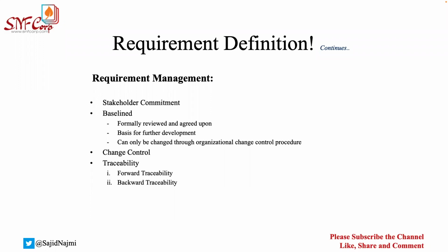So what is forward traceability and what is backward traceability? We know traceability is something we need to track from one source to a different source. Forward traceability means you are going from your traceability matrix to your software requirement document, the SRS. You have one ID. From that ID, you go to the SRS and find that ID there as well. You will see the details of the requirement and you can tell the person, okay, this is what we have mentioned as the requirement, and this is exactly what it is going to do. All functional and non-functional things you can track and tell people.